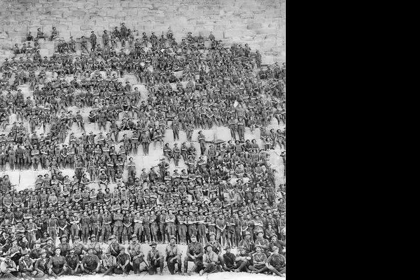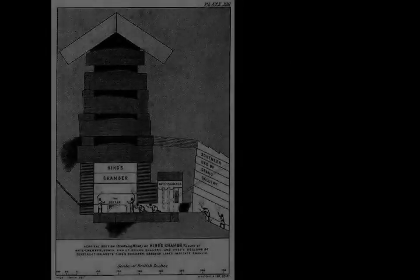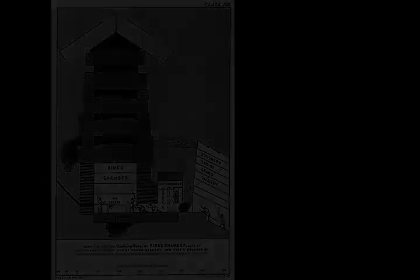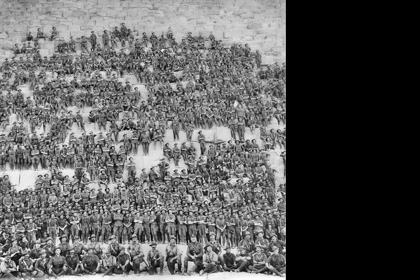A modern construction management study, in association with Mark Lehner and other Egyptologists, estimated that the total project required an average workforce of about 14,500 people and a peak workforce of roughly 40,000. Without the use of pulleys, wheels, or iron tools, they used critical path analysis methods, which suggest that the Great Pyramid was completed from start to finish in approximately 10 years at a rate of up to 3 blocks per minute on certain levels.